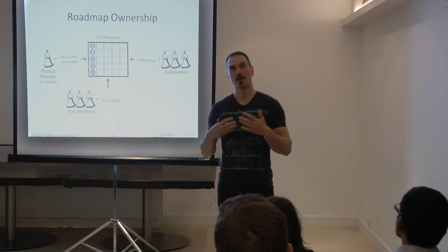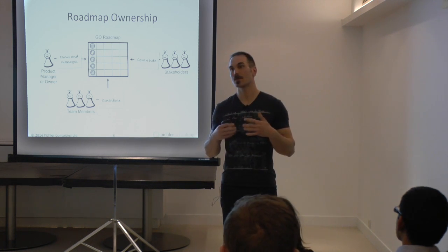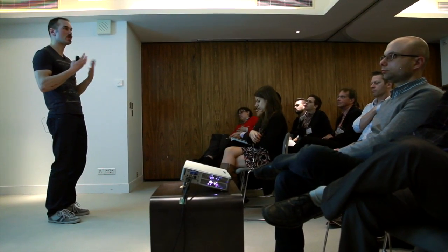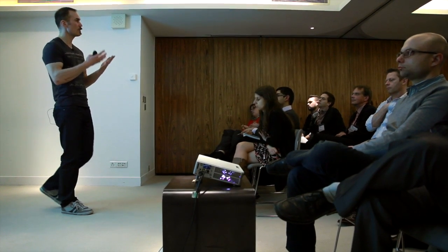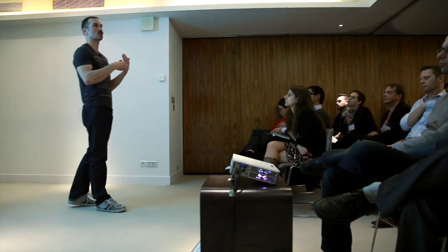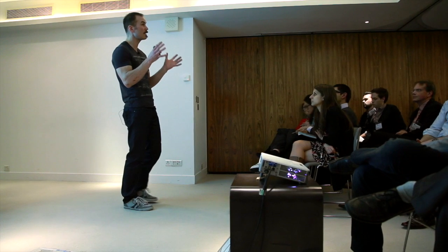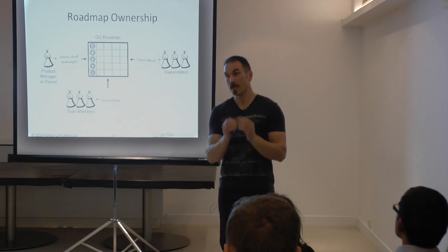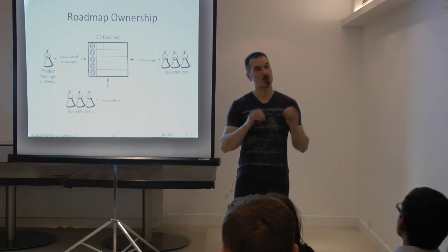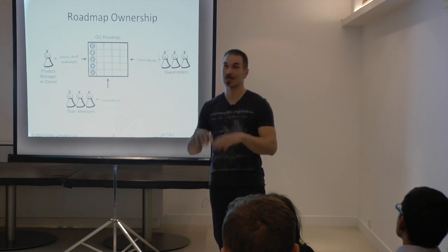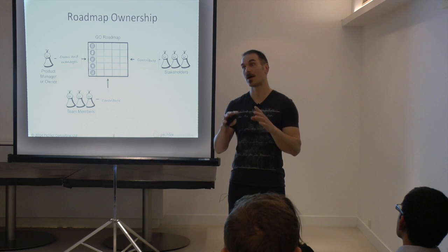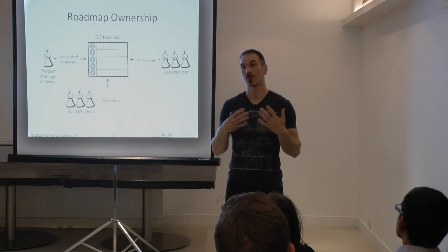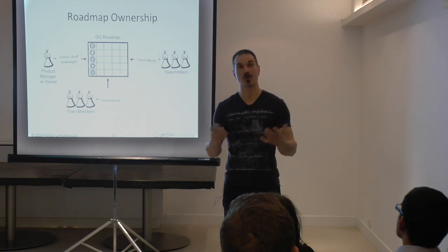So whenever you engage with the stakeholders and the team members, again, I would encourage you to work on and focus on establishing shared goals. And based on those goals, then have the discussion around what are the 2 to 3 high-level key features that we believe are necessary in order to meet the goals. All the other feature and requirements and stories and user interaction and visual design discussions, I suggest you have as part of your product backlog and product canvas process.